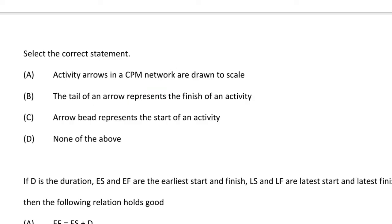Next question — select the correct statement: option A activity arrows in a CPM network are drawn to scale, option B the tail of an arrow represents the finish of the activity, option C the arrow head represents the start of an activity, option D none of the above. The correct answer is option D, none of the above.